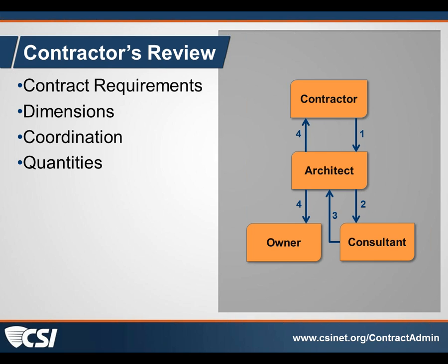So, this is what we've been talking about. The submittal starts with the contractor. They're to be reviewing the package, the information, the product to compare it to the contract requirements, to be sure that it meets those requirements. They're looking for dimensional information. They're responsible for coordination within other products, as Doug just described, on the site, and they're also responsible for quantities, so that this information is properly ordered for inclusion in the project at the proper time.